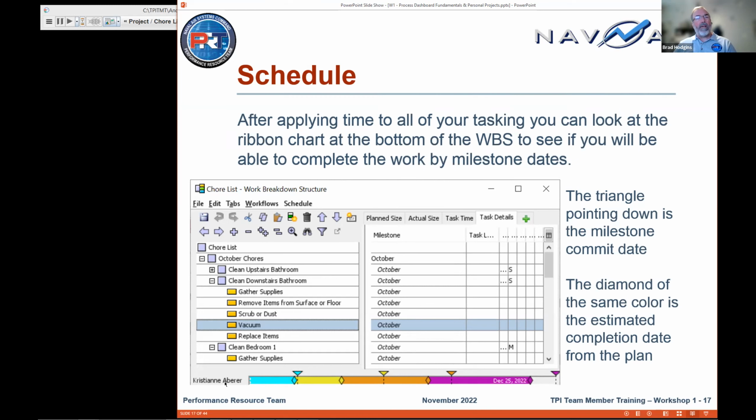In this case, Christiana's an army of one, and her availability is four hours a week. Compared to the pile of all the planned time of all the rocks associated with October, that shows she's just going to get it done in time. And then in November, this is Thanksgiving, this is November. So if this is the Thanksgiving one, here's your pile for Thanksgiving. The tool assumes, for simplicity, that all the stuff for October will be done before the Thanksgiving work, which will be done before the November work, which will be done before the December work is done.